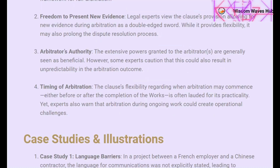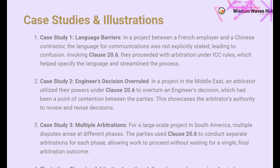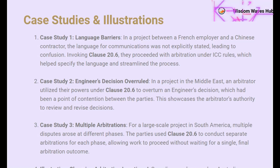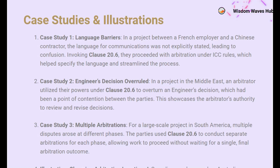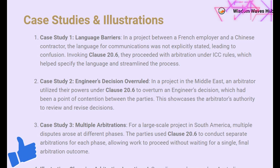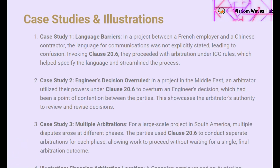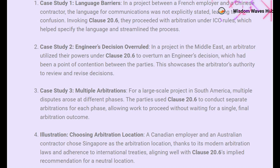Let's look at some real-world case studies that illustrate the application of Clause 20.6. In a project between a French employer and a Chinese contractor, the language for communications was not explicitly stated, leading to confusion. Invoking Clause 20.6, they proceeded with arbitration under ICC rules, which helped specify the language and streamlined the process. In a project in the Middle East, an arbitrator utilized their powers under Clause 20.6 to overturn an engineer's decision, which had been a point of contention between the parties — showcasing the arbitrator's authority to review and revise decisions.